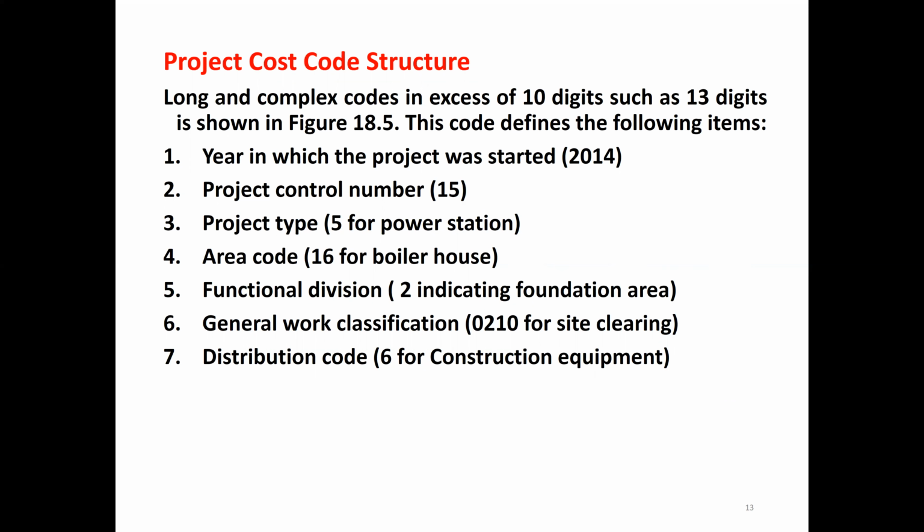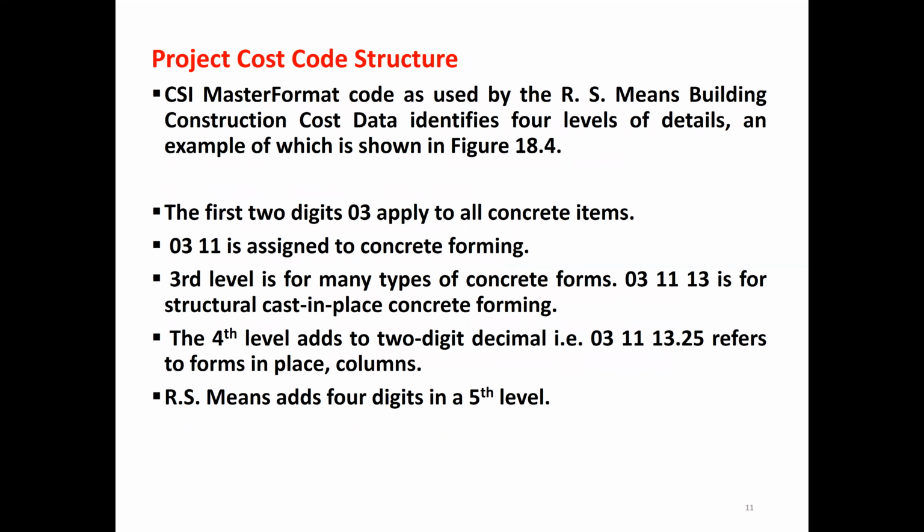Then 0311 is assigned to concrete forming. The first two digits, like 03, apply to all concrete items.